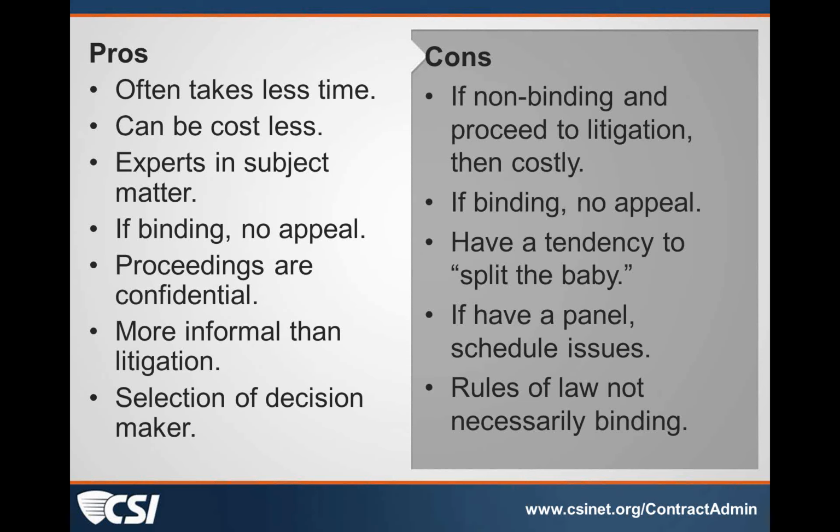During construction, if a dispute arose between the owner and the designer, without creating a bunch of hypotheticals, I could foresee a situation where that could hold up the contractor quickly. Say the owner's not paying a design professional and they're disputing over money or errors and omissions or whatever, and then the designer says, well, I'm just going to stop work.